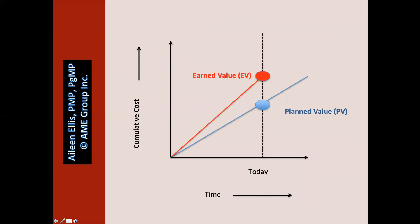Here is an XY bar chart — a different way to look at this. The blue line is the planned value across the life of the project; the red line is the earned value, or how much work is complete. The vertical dotted line is today. The blue oval shows what should be complete as of today (planned value); the red oval is what is complete as of today. We've completed more work than planned — this would be a positive schedule variance; we are ahead of schedule.